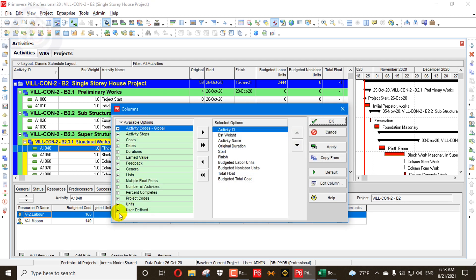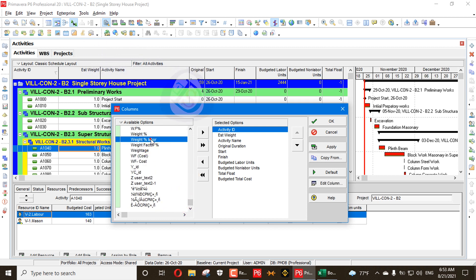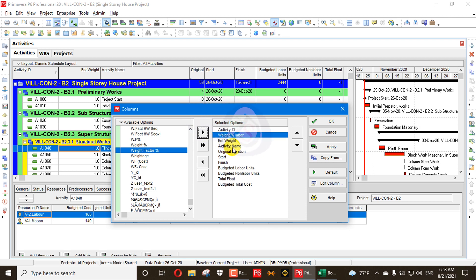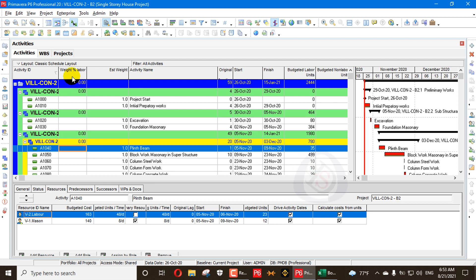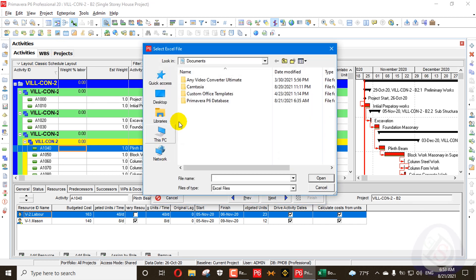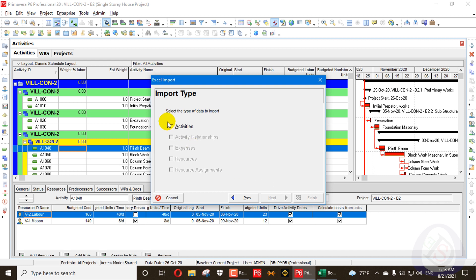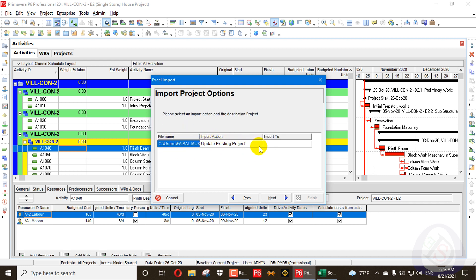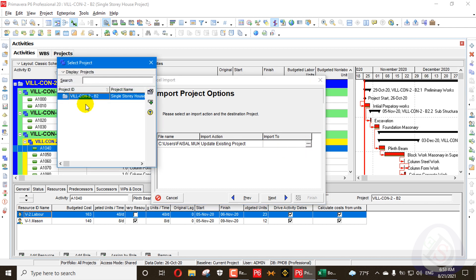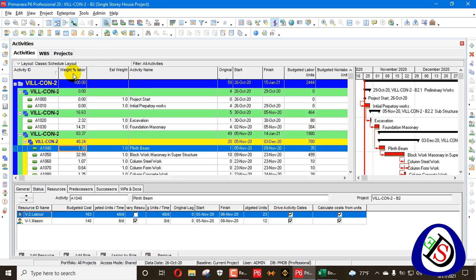In Primavera P6, I'll add the user-defined field column — go to User Defined Fields, find 'Weight Percent Labor' under W, and add it. You can see zeros in the column. Now I'll import the modified file: go to Spreadsheet, Next, select the file from desktop, open it, Next, Activities, Next. In the import options, select 'Update Existing Project', say Yes, then Next and Finish. All weightages are now added.